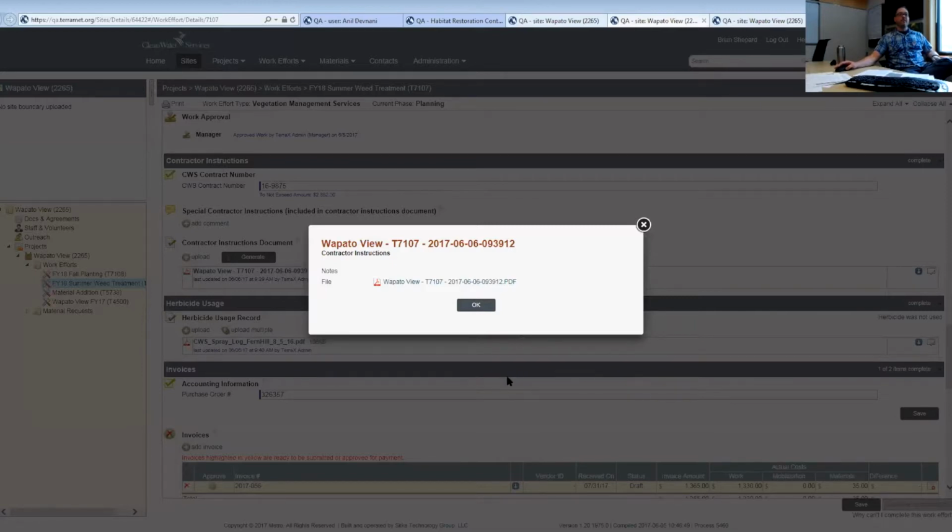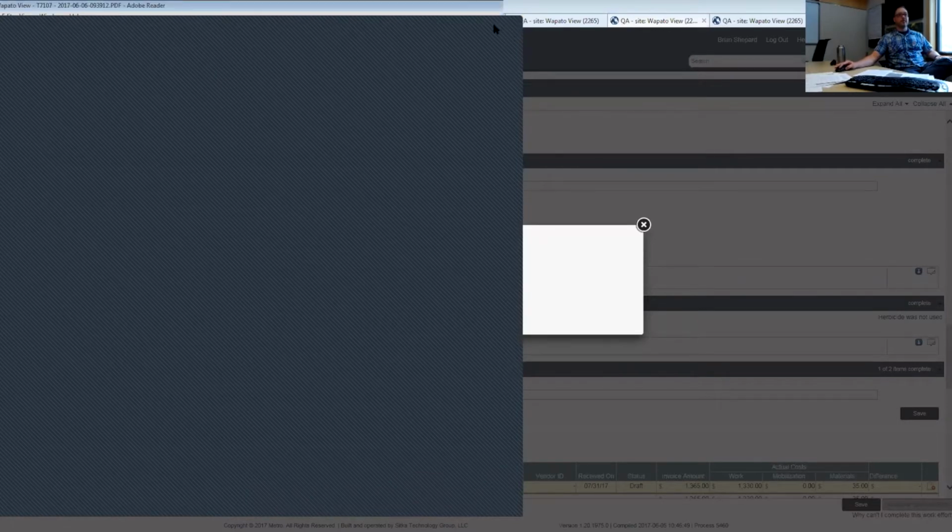We had a review process with our legal department to get this wording correct and make sure that all of the information that was needed was included on here, such as that contract number that was just included, an expiration date, a not to exceed amount, as well as contacts for Clean Water Services and the contractor that we're doing work with. Again, all of this comes straight from the system, and that's a huge improvement to what we had before, whereas people were trying to create this in Excel and then copy and paste it into a Word document that legal really had to scrutinize to make sure that everything was done correctly in the process. Now it's generally accepted that any of these documents that come out of TerraTrak follow our formatting and have the data that's required to get this out.